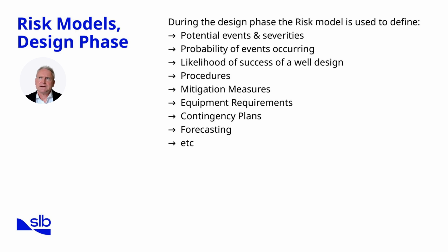Contingency planning is another key element. Whether it's backup mud systems or a sidetrack strategy, the model ensures we have predefined options. Forecasting rounds out the picture, giving us visibility into what is most likely to happen. This structured, forward-looking application of risk models during design lays the foundation for safe and efficient execution. Next, let's see how the model adapts once drilling is underway.